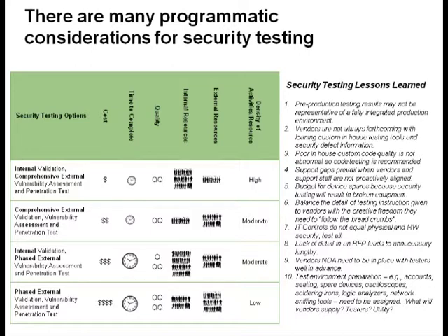And I think the last point here from lessons learned is that, not only from a security standpoint, when you're managing these kinds of engagements, you do a lot of project management work too. Bringing in external resources or lining up internal resources to do testing, you have to figure out where the testing is going to take place and what tools you are going to use. A lot of this equipment has special adapters and interface applications to do the testing. So take that into consideration. You can't just drop a pen test team into a working environment and expect to get quality results. There's a lot of front-end planning that needs to go on.